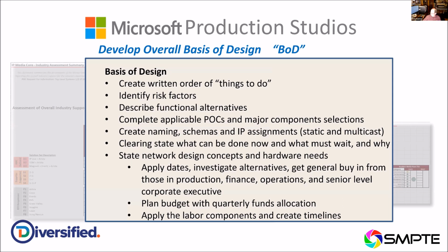A risk factor could be, what if there isn't sufficient budget for it? What if the operator hates the product, like doesn't like the control panels or something? What if they can't deliver the products? What if it doesn't integrate with other things? All these risk factors got identified, again, in another set of spreadsheets or whiteboards or post-it note applications, so that no one was going to be surprised by the consequences of making decisions.